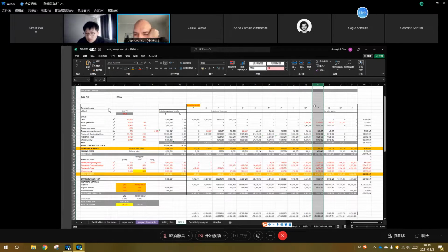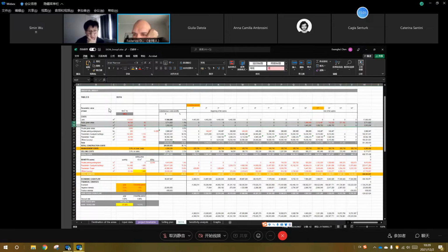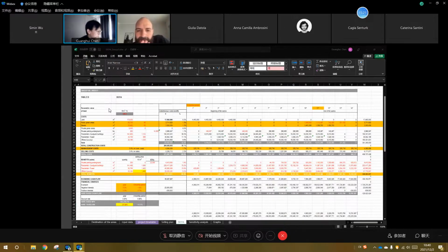In the distribution, you can see that the value in this period is negative. Maybe you can start to realize the public green area and streets earlier, in order to not have more cost in the last period. So please try to do these changes and we can take a review again.